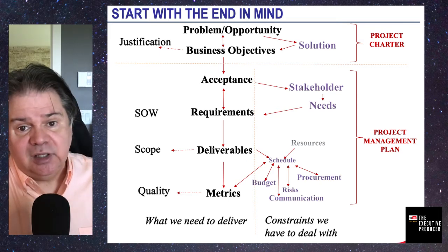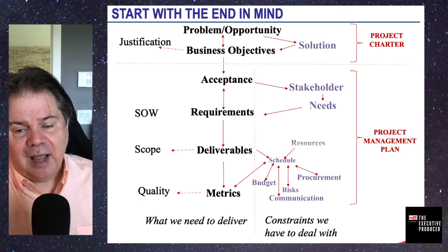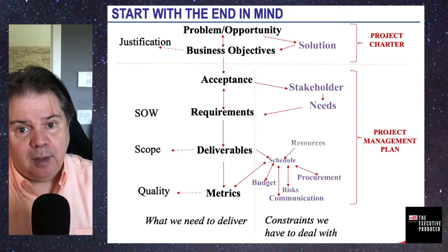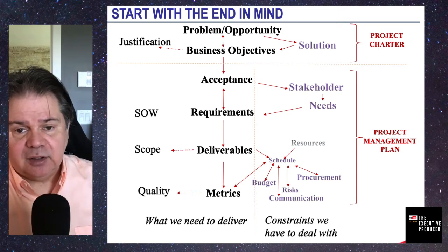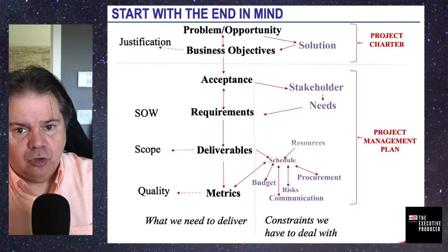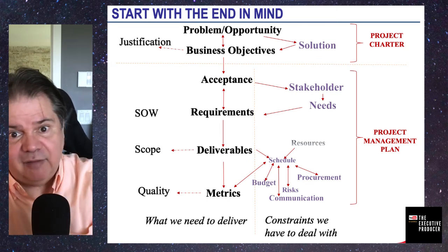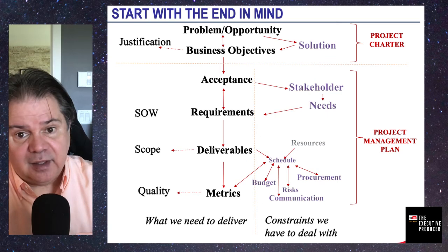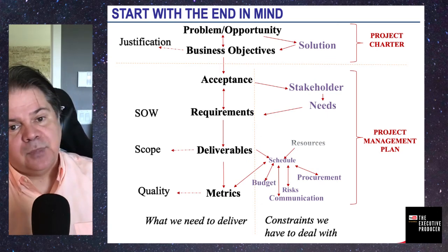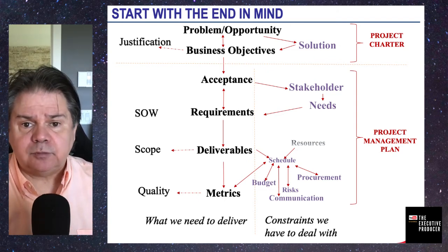You're intentionally investing resources to prevent certain things from happening, or you're investing resources to be ready to deal with a problem if it happens. For example, let's say you're doing an event outside. I'm going to have a tent ready to go if in the morning it rains. Well, you're going to need to do the activity to bring the tent and have the guys there waiting. So this also will affect your schedule and will affect your resources. So risk is going to be a big part.